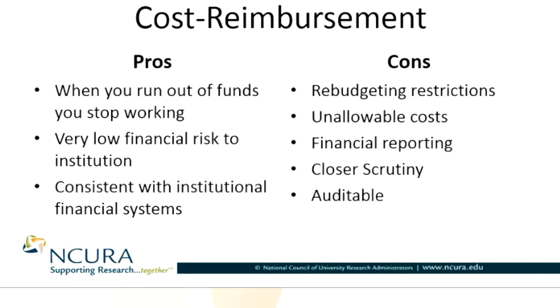So just to clarify this a little bit, most of the grants and cooperative agreements we receive as nonprofit institutions from the federal government are cost reimbursement. You don't really see this term used in federal grants and cooperative agreements, but they are cost reimbursement. That's the basis for payment. For example, monthly in arrears. We invoice or draw down from the government after we've incurred the expense. And our financial systems are really designed around a cost reimbursement model.